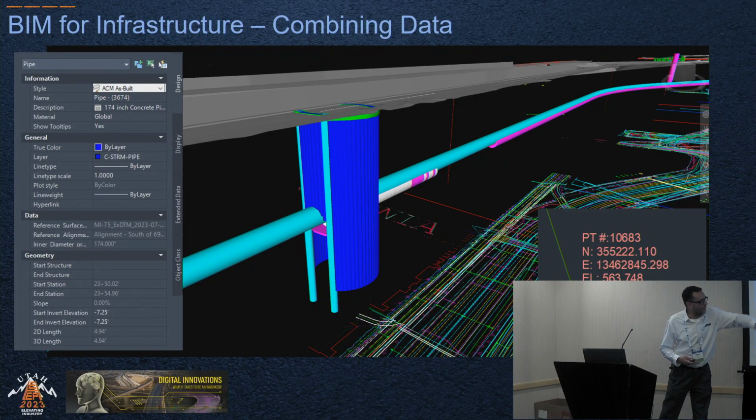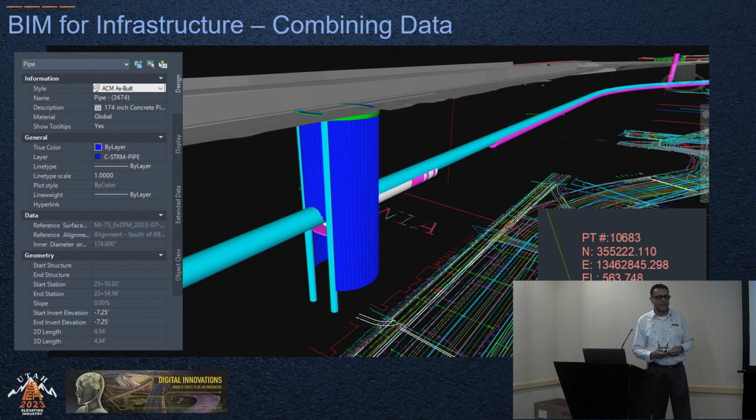Because of all of that parameter information that I talked about earlier and put in, all of this is survey accurate. LiDAR scans for the surface, the boring of the actual tunnel itself, the individual tunnel rings. That's what you're seeing in the lower right-hand corner. The date, the ring number, the stationing of those rings was all important. This was something MDOT didn't expect. They love it. They love it because they know of the thousands of rings that are making up this tunnel. They know where everything is. They know exactly where it's at.